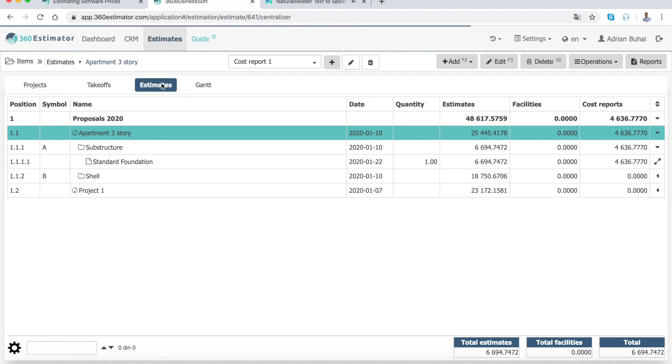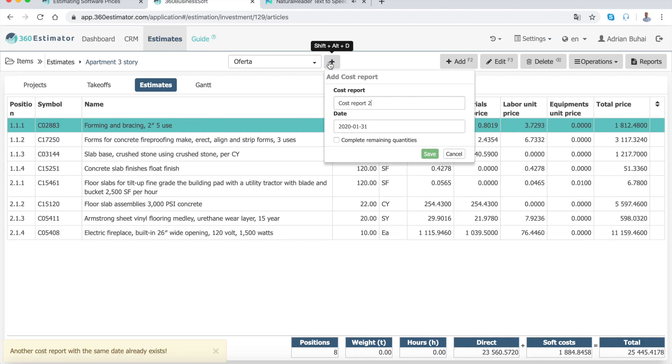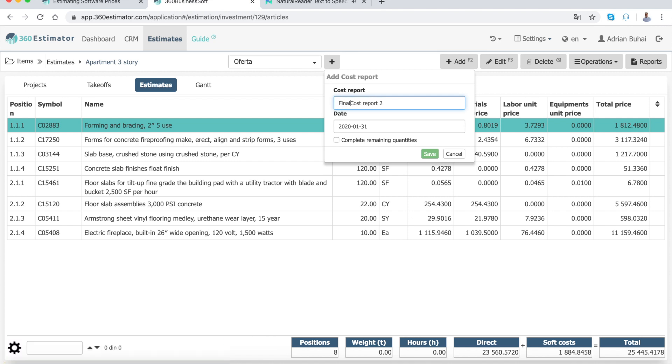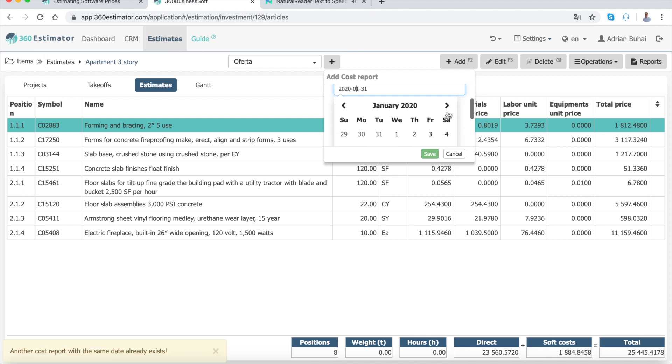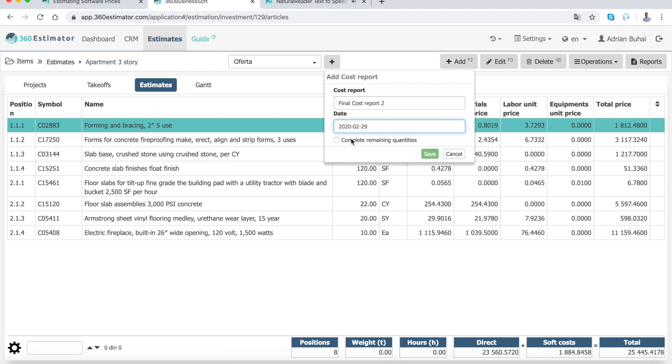From the top of the table, press the plus button from the right of the proposal box. Enter the name and date of the cost report, for example, Final Cost Report, and enter the date for your final cost report, for example, 29 February. Check the complete remaining quantities and press the save button.